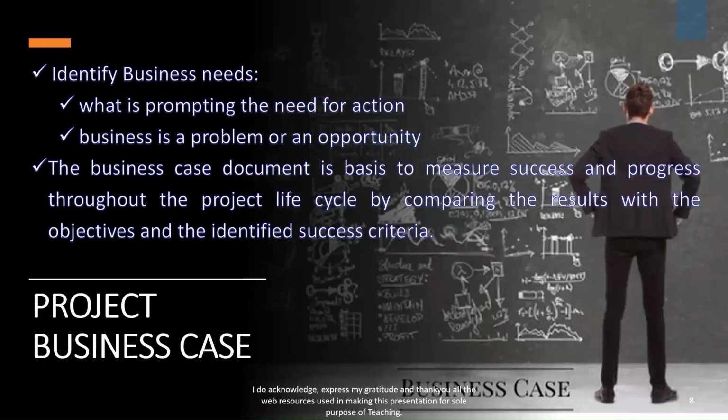We write our success criteria also in the business case document. That means the production should never drop below 70%. Sales are assumed to be minimum 60% average, annual average of the production capacity.